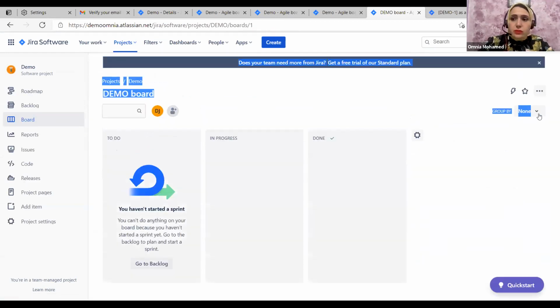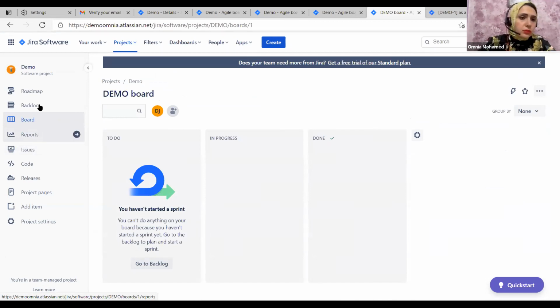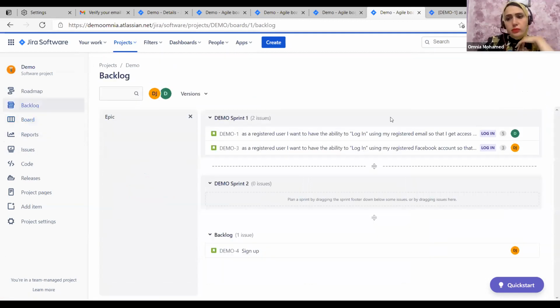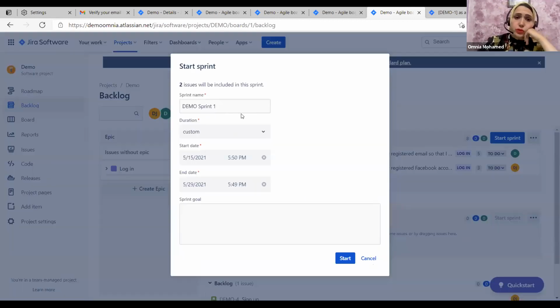We can start our sprint from here. We have only 10 minutes, so we'll start it, and we'll show you how. Once you start, make sure the sprint name is correct. For sure, it is in sprint planning. In the sprint planning, the team sets the subtasks and the estimate of the subtasks. We can simulate anything. For sure, if your sprint is 2 weeks and it will start today, it will automatically calculate the end date, and define the sprint goal.